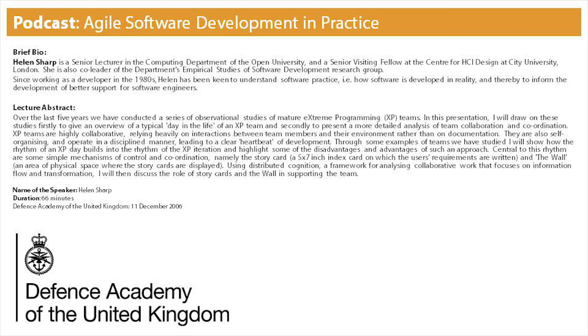How do you do testing? If pair 1 is building a function and pair 2 is building a function, and the one that pair 2 is building needs the one that pair 1 is building in order to work, there's a dependency there. So the developers would know that, and they wouldn't develop them in that order. When it came to stand-up, we'd say, right, well, there are these 2 cards here, but before we can do that one, we need to do that. Well, they'd make sure that the first one was done first.